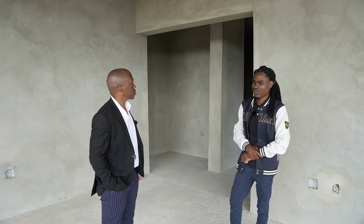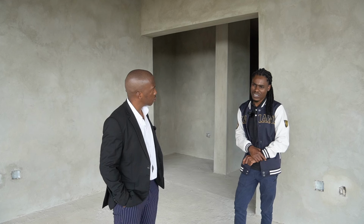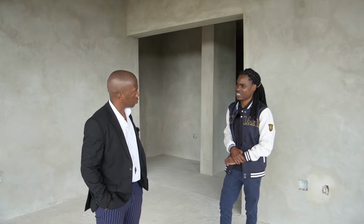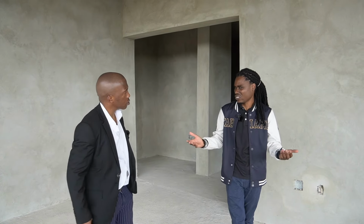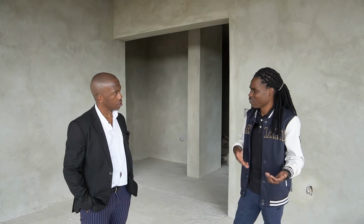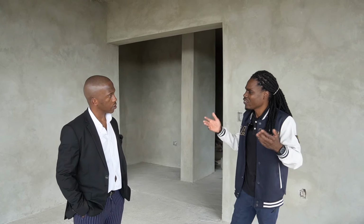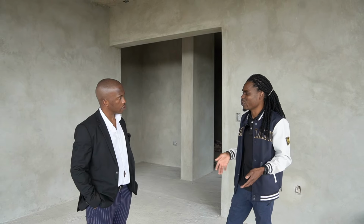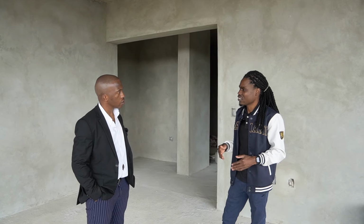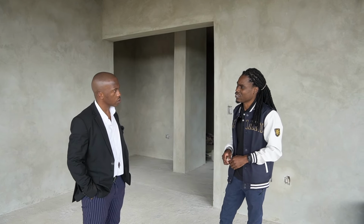Yes. Just to highlight on that note, as structural engineers, we don't normally recommend people move in before the outside work is completed. Outside work as in landscaping? Not really landscaping, but slab or paving needs to happen around the building, because we are trying to avoid the issue of rains and the drainage system compromising the foundation of the house. So we don't normally recommend anyone move in before any apron or slab is installed around the building. That makes sense.